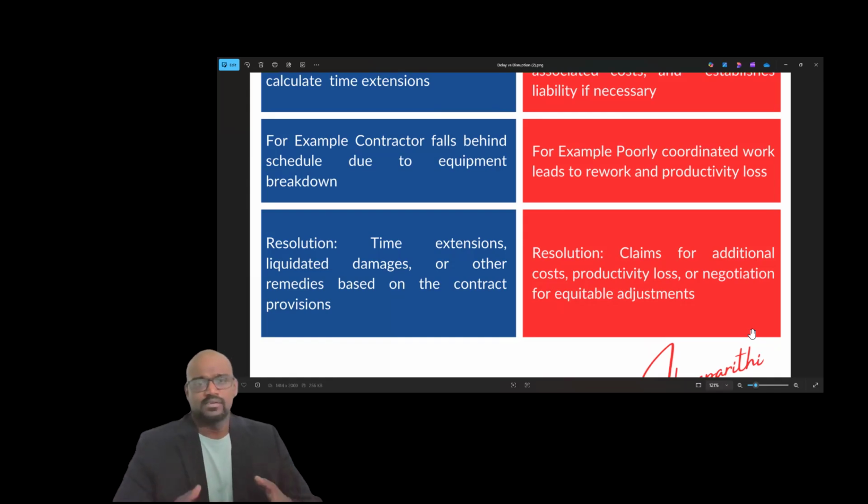So you are measuring with reference to a milestone which is achieved without disruption, and you are comparing it with disruption, and you are proving that without disruption this is my performance, and with disruption this is my performance. So I'm eligible for the delay, or I'm eligible for the acceleration being done, or I'm eligible for the cost which we have lost in the additional resources.